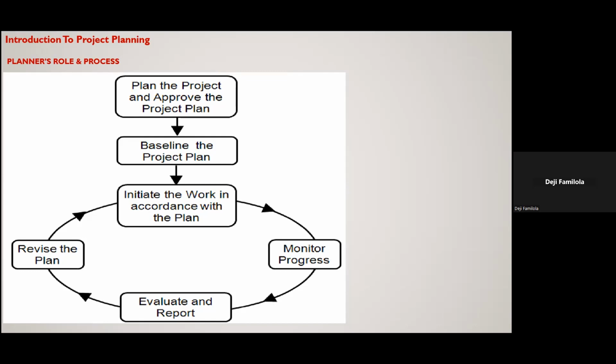Once the plan is developed by you with the help of others within the project management team and your core team, then all of you will need to agree, like what I mentioned last week. Once you agree, they call it the internal baseline, because you've agreed internally that this is the way we're going to carry this project out during the execution phase.